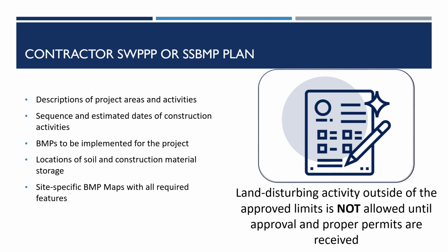If changes to the project BMPs or land disturbance are anticipated, revised documents, including the updated SWIP or SSBMP plan, must be submitted to and approved by AREE. A more in-depth explanation of changes that trigger document revisions will be included in Part 2.